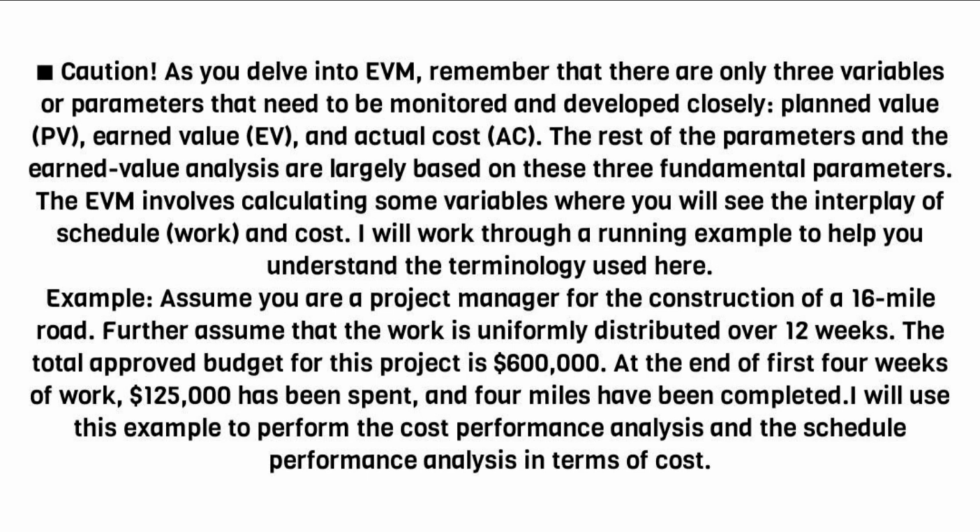Example: assume you are a project manager for the construction of a 16-mile road. Further assume that the work is uniformly distributed over 12 weeks. The total approved budget for this project is $600,000. At the end of the first 4 weeks of work, $125,000 has been spent, and 4 miles have been completed. I will use this example to perform the cost performance analysis and the schedule performance analysis in terms of cost.